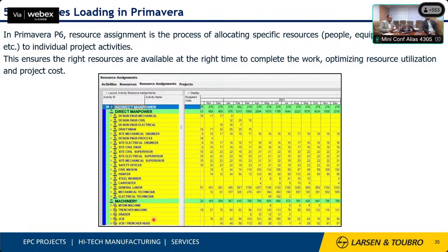So, sir, all the resources which we define and then assign to various activities, we can go to the dashboard of resources itself and see month-wise what is the requirement as per the agreed baseline program, and that will give us a resource-type-wise deployment schedule. So how the equipment will be deployed, how labor is needed, and in certain cases where a specialized agency or certain revenue expenses are there, that also we can assign, and that will be shown in currency.